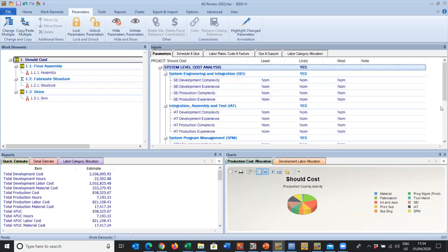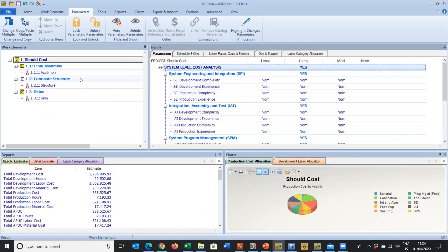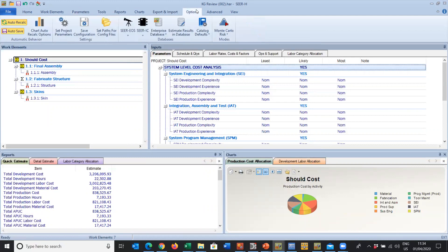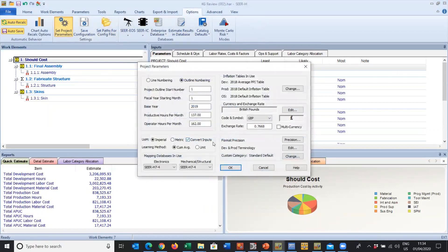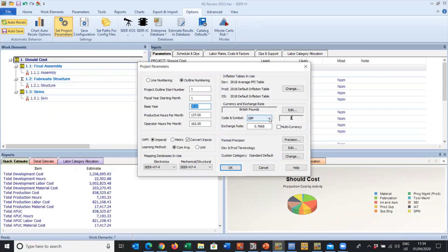When we start a project, we normally go into selecting knowledge bases, and these knowledge bases are going to be setting the labor rates for you based upon the currency that you're working in. Under Options, Set Project Parameters, we have the ability to look at the base year we're working in, are we using the appropriate currency, are we using the appropriate inflation table.